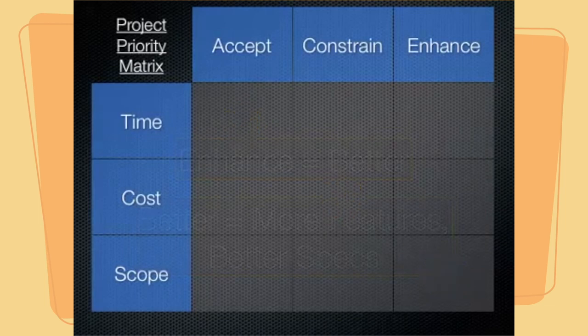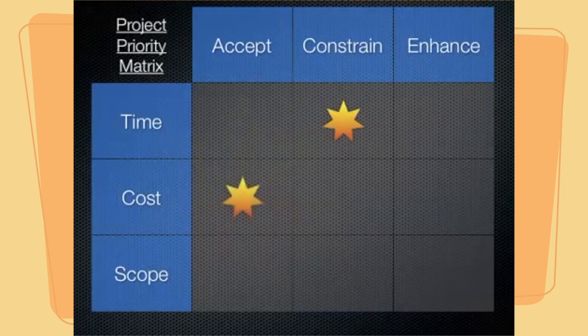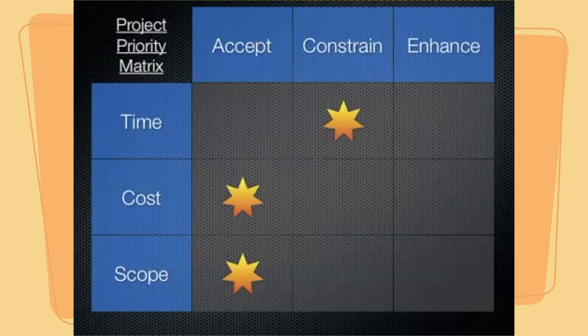Let's consider another example. In this example, we are going to constrain time, accept changes in cost, and also accept changes in scope. This is not atypical of something like a software development project, where we have a specific deadline to meet — perhaps releasing software at a trade show or event that impacts how well the product will sell. So it is vitally important that we constrain that time, and we are willing to accept changes to cost or scope.